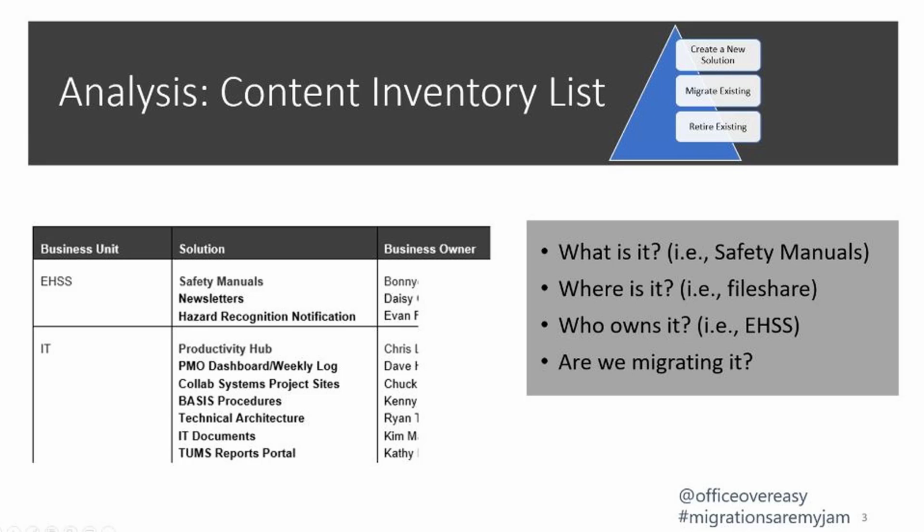I mean, you don't have to be too prescriptive. This is a very high level thing. We're not deciding where things are going to go right now. The only thing we're deciding, if you look at that graphic in the upper right-hand corner, is what we're going to migrate and what we're going to retire. So I say at this point, you have 2 lists because you want them to sign off on both things. You don't just want to say, oh, this is in scope. If you've ever looked at what I would call a great scope of work, a great scope of work has what's in scope, but it also has what's out of scope, just to very clearly call out what we're not planning to migrate for whatever reason.